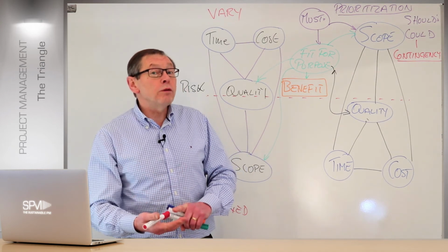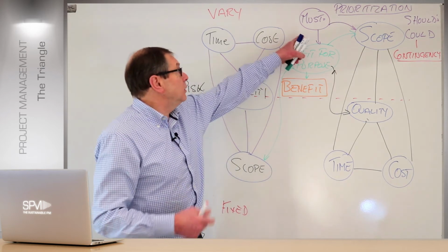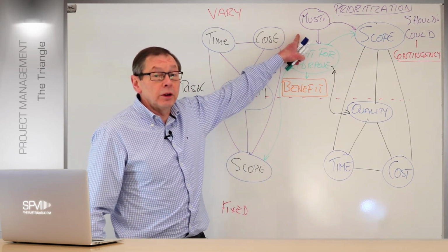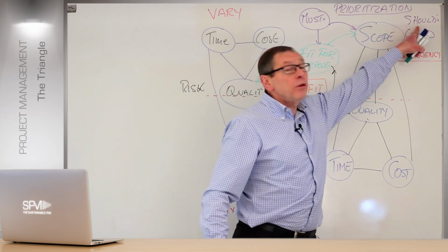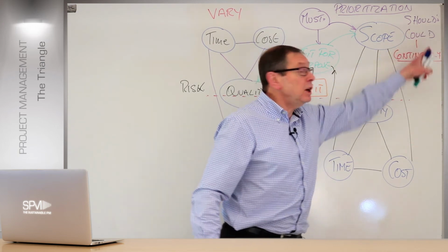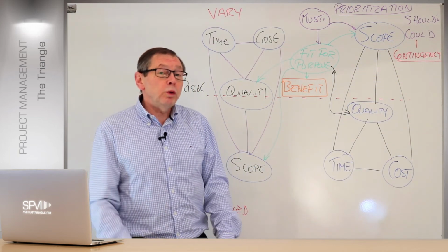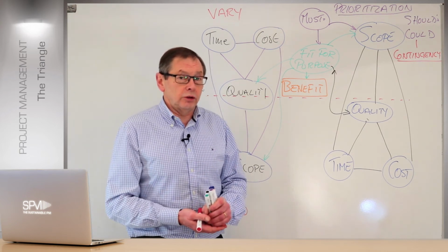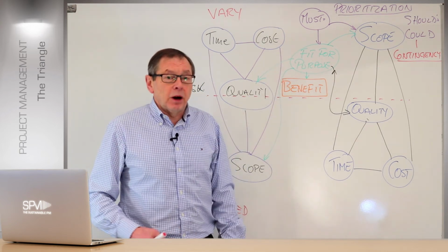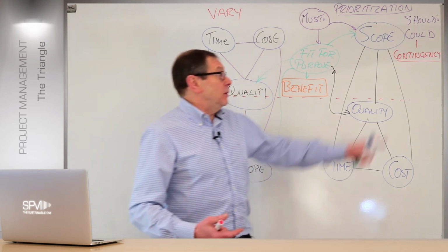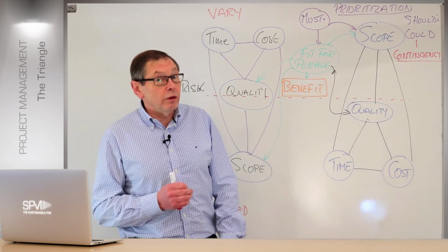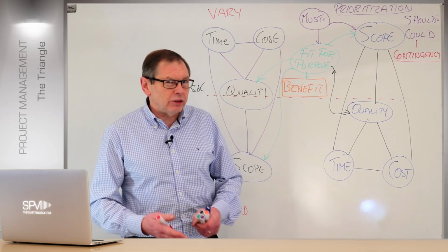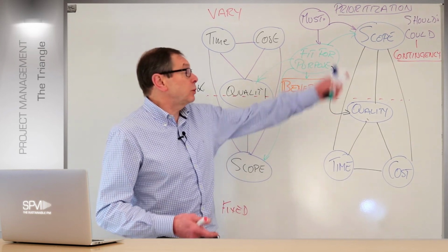It can help me with the overall project to ensure that I deliver the minimum subset, the must-haves, and hopefully most, if not all, of the shoulds, and as many of the coulds as I can. We'll always work backwards from the coulds and then the shoulds. Certainly never get to the must. This is alarm bells ringing. In fact, if you're starting to impact on the shoulds, you're doing that already, really. Right? This is part of the managed by exception thing. And that's where the tolerance is.